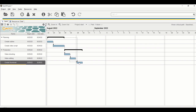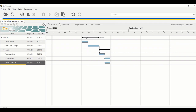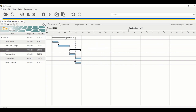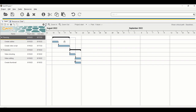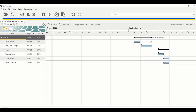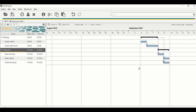To move a taskbar's position, hold Ctrl and drag the taskbar. By default the start date is today, but you can change it to an earlier or later date this way. For example, if you want the project to start one month from now, just hold Ctrl and drag. I'll set it to start on September 5th.